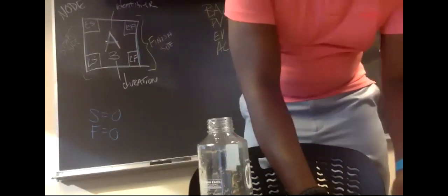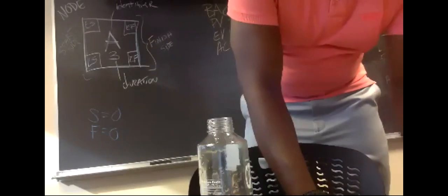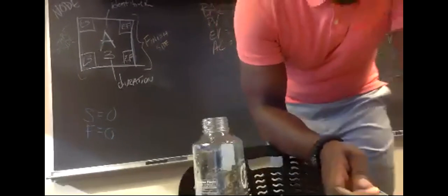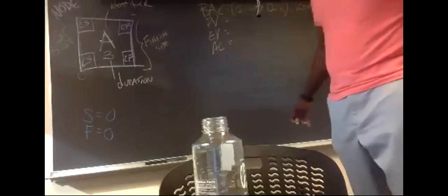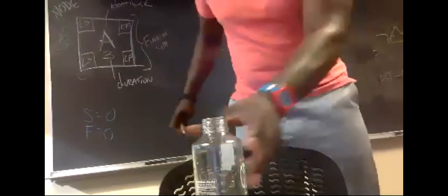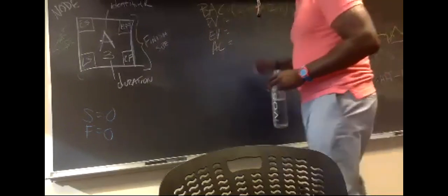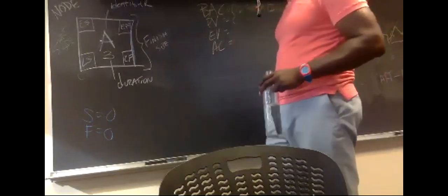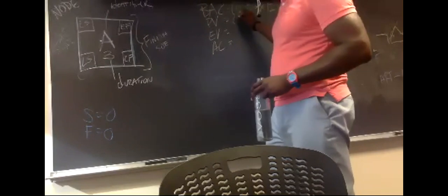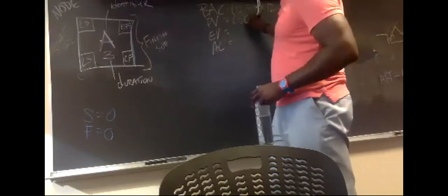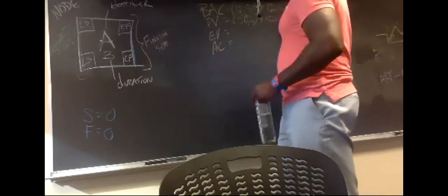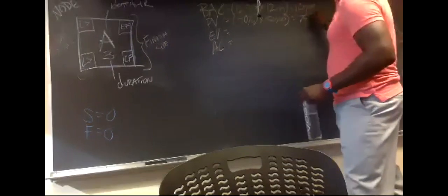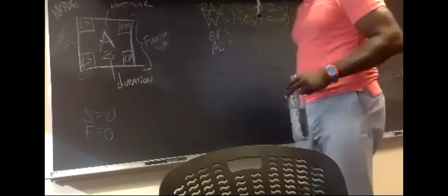Anybody care to dive in? Plan value is the plan percent complete times the BAC. So we got 6 of 12 months as the percent complete, right? What is that in percentage? It'll be 50, so it'll be half of the total. So that'll be 75K. We get 50% times 150,000 equals 75K.